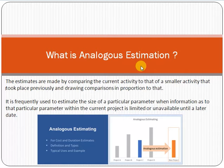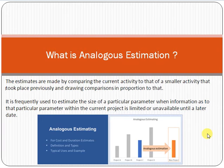For example, assume you are a project manager and your boss says you have to build an e-commerce solution for a company. How can you use analogous estimation here? With analogous estimation, what you have to do is compare your new project with existing or previous similar projects, and then get some technical expertise — expert judgment — on how much time is required.